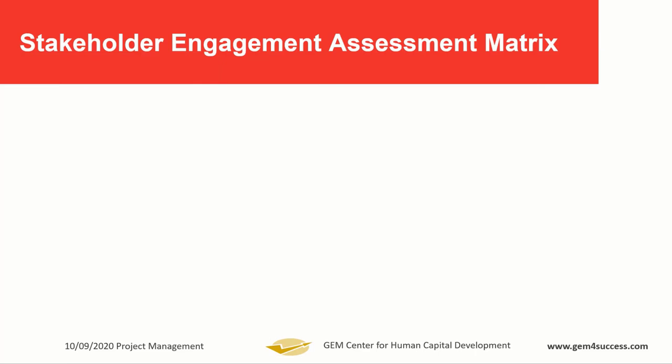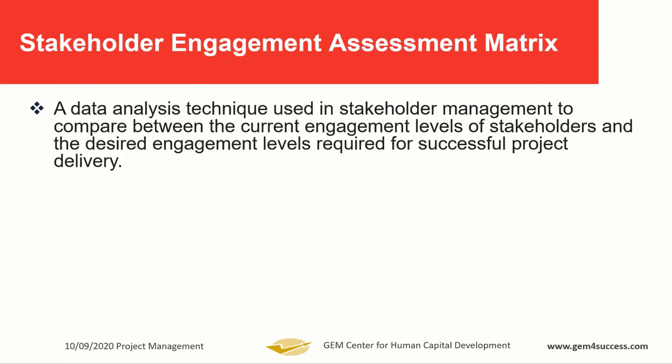So there's something we call the stakeholder engagement assessment matrix. This is one of the data analysis techniques I mentioned earlier while we were looking at the ITTO chart. This data analysis technique is used in stakeholder management to compare the different engagement levels of stakeholders and the desired engagement levels required for successful project delivery.